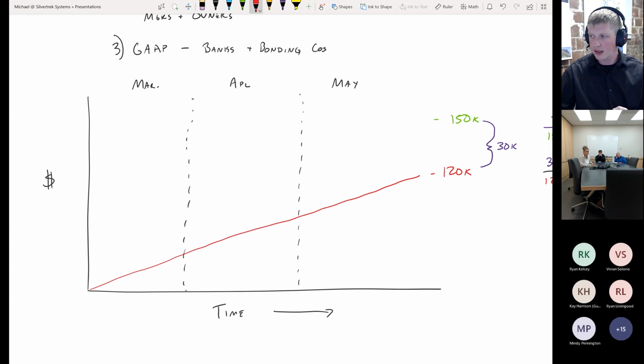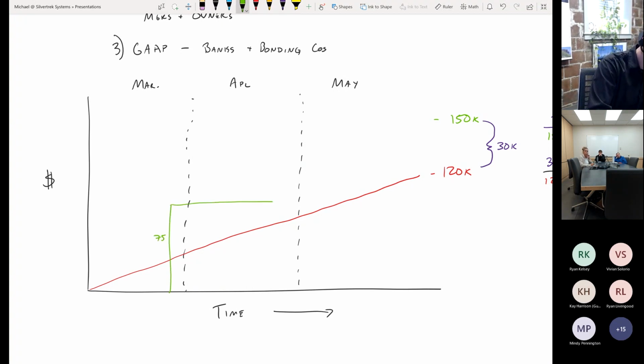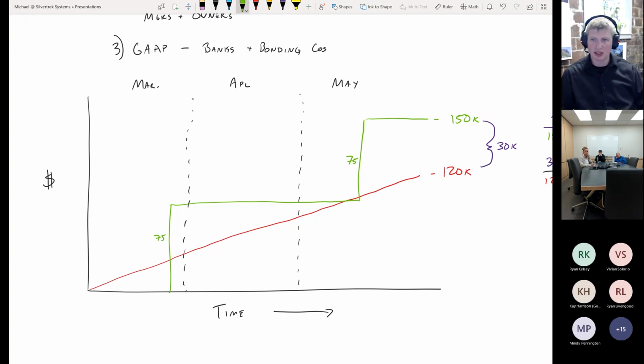So the billings, on the other hand, we don't have that same kind of regular consistency. We typically can only bill in chunks. So in this particular job, let's just say that we can only bill in 2 individual bills. At the end of the first month, we can bill $75,000, and towards the end of the job, we can bill the final $75,000. All right, pretty typical, 2 progress billings on a job, and the costs are coming in over time.